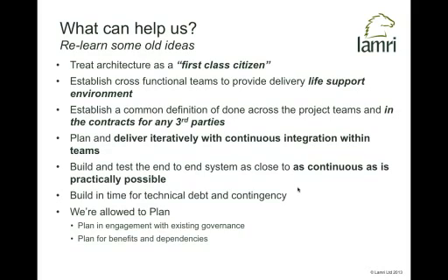Something we've come across, especially when you're working with third parties, is you've got to be really, really careful about what our definition of done is. By definition of done, what I mean is, when is a sprint done actually? What do I have to have achieved to have basically closed the sprint off? Is it just enough to have written my code and run some unit tests? Maybe that's done. Maybe I need to put everything back into configuration management, check it out onto another box, build it all from scratch and then run the tests for that sprint. Is that done? Maybe, maybe not. Maybe I also need to run regression tests to ensure that I haven't broken anything from previous sprints. Well, maybe that's done. Or maybe I also need, what about any documentation, any help guides, anything like that? Maybe that needs to be done as well.